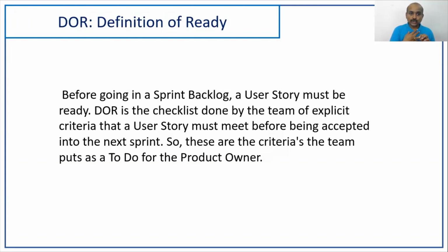Acceptance criteria should include happy paths, alternate paths, failure paths, and also the performance conditions. And the performance criteria, scalability and reliability factors are taken care of, boundary conditions are taken care of, the mock-up screens are available, and all the dependent stories are defined clearly. Only then can I take up a story.